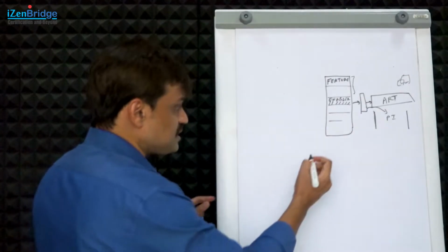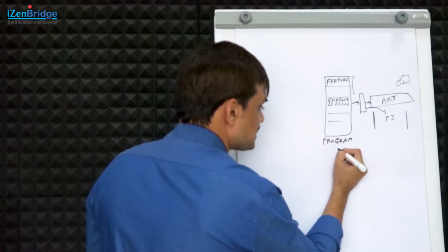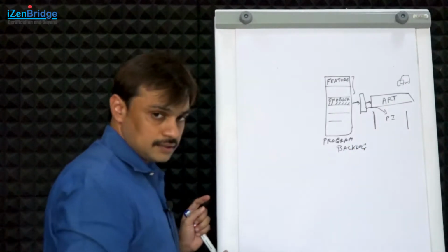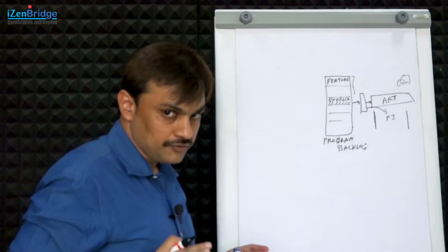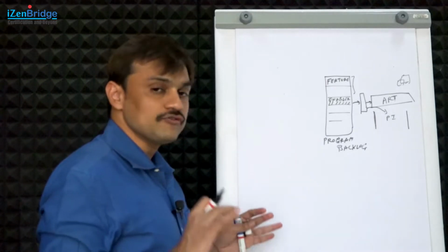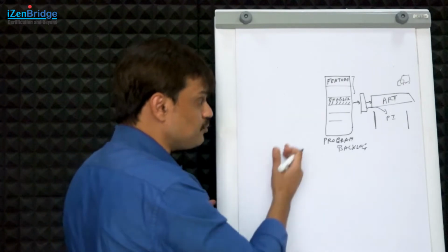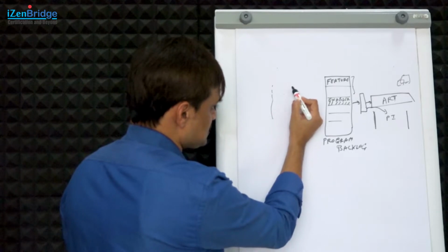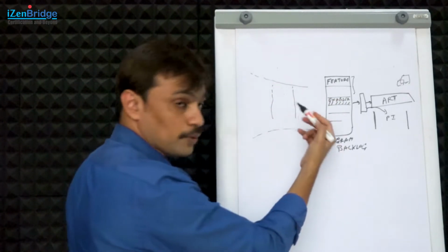Now, something which has reached the program backlog is expected to be well refined. Unlike other backlogs where you see the upper items are refined and lower items are not refined, this is not the case in the Scaled Agile Framework. The program backlog is a well refined collection of features and enablers. You may be wondering when this refinement is happening. You may have a Kanban process which is creating a feed for this whole program backlog.